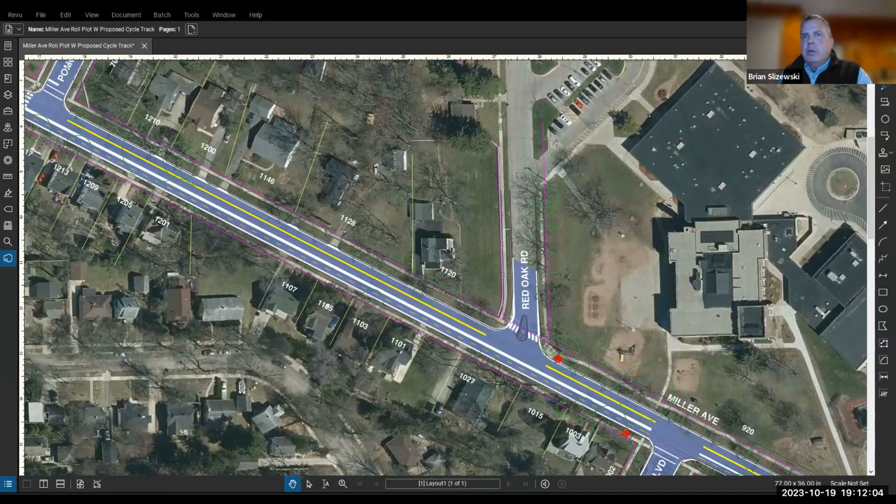So construction on the utilities on the water main, we're looking at starting those in the spring. I'll just say April as a potential start date for that. It's potentially pretty early in the year. So that's when we would see the work start. It would continue from completing the water main construction, some stormwater improvements, and then once those are completed, later in the summer and into the fall to complete the paving work on the project.